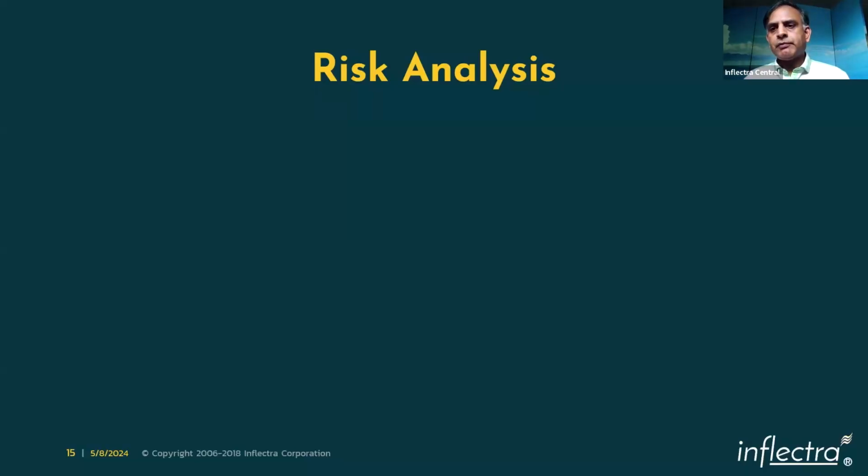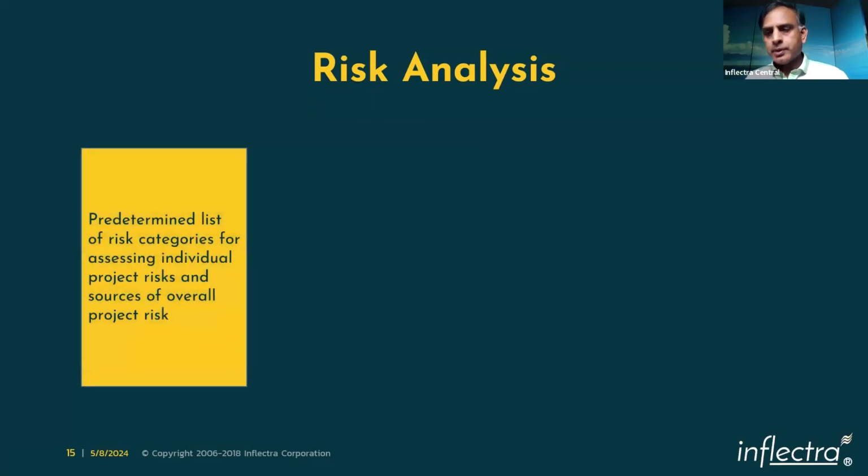So risk analysis. After the identification, you are moving into the risk analysis. And here, like I mentioned, you want to come up with what is the most important thing that I should work on, right? So when you are doing this, you want to start categorizing the risks, because it makes sense for you to analyze all of the related things together, so that you're not missing out the importance of something else impacting as well. So you want to take a look at what is individually impacting as well as impacting overall.